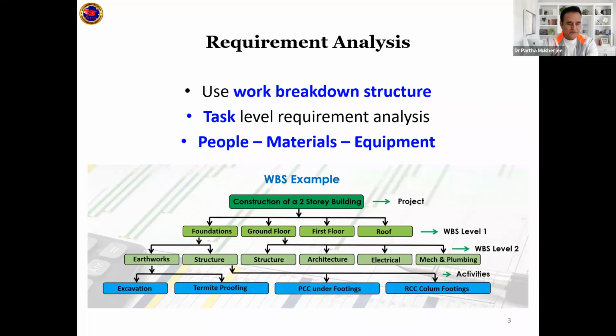This is a familiar chart: when you break down the project, you will see there are 4 levels. The first one is the overall overview of the project. The next one, you divide the project into very broad work packages or phases. Then the phases can be broken down into work packages, and the work packages have tasks.